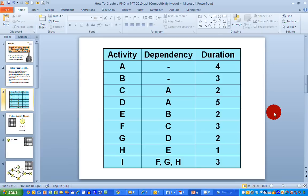Activities A and B have no dependencies. Activities C and D are both dependent on A being complete, and activity E is dependent on activity B being complete. We work this out until we get to the end of the table where activity I is dependent on activities F, G and H being complete. In the third column, we have our durations — these could be hours or days. For our purposes here, we're going to assume these durations are in days. As a project manager, you will have previously worked out the dependencies and estimated the durations for each activity.